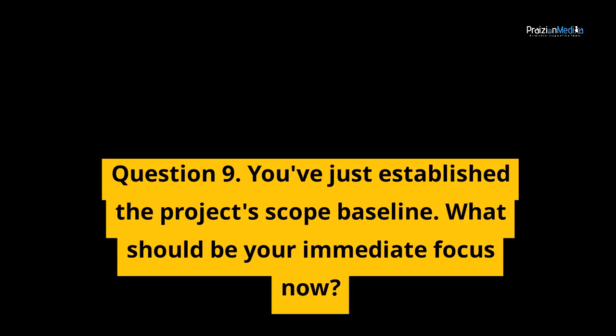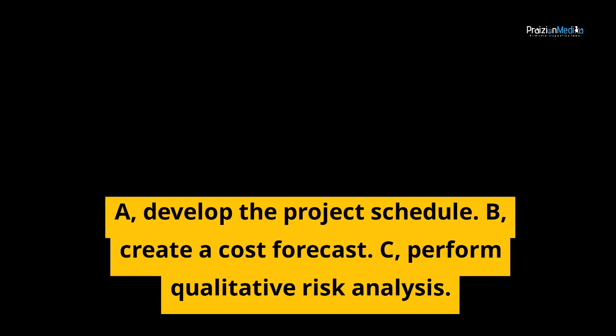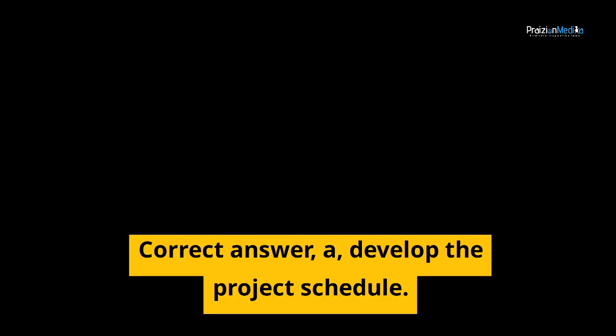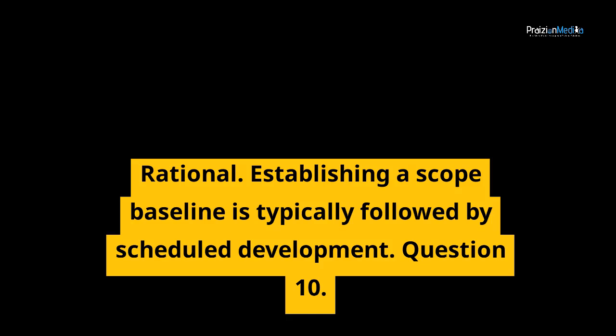Question 9. You've just established the project's scope baseline. What should be your immediate focus now? A. Develop the project schedule. B. Create a cost forecast. C. Perform qualitative risk analysis. Correct answer A. Develop the project schedule. Rationale. Establishing a scope baseline is typically followed by schedule development.